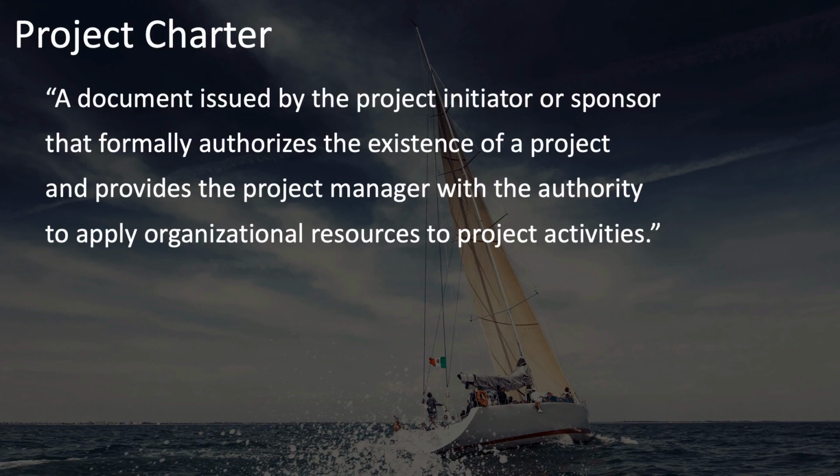Also note that it is the project charter that authorizes the existence of a project. This is basically your kickoff document for starting a project. It also provides the project manager with authority, and this means that the project manager is identified and named in this document, so you know who the project manager is.